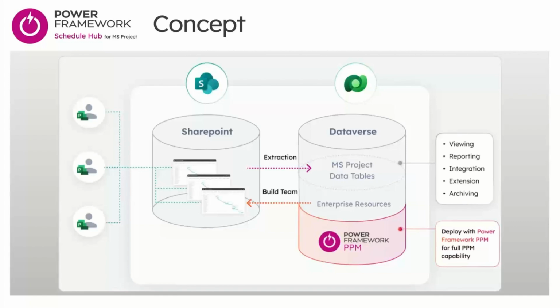And you also see that we will have an enterprise resource table again in Dataverse that Microsoft Project can connect to, and we'll be able to build our teams, populate our resource sheet in Microsoft Project with resources that are held centrally. With that we can connect work assignments from all of these different projects to individual resources and understand their total work demand from all of these projects, and compare that to their capacity and do resource reporting.